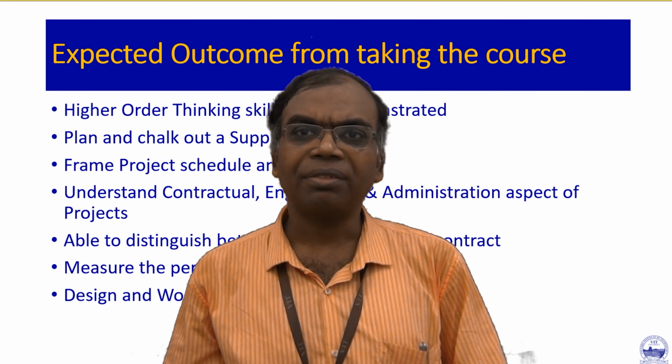Moving on, you will also see that you need to source objects at the right time. So you cannot source, for instance, tiles at the time when you're constructing your foundation. You need to source it in sync with the master schedule, and you cannot source tiles after the delivery date also. So there's a sweet point where you buy it at a time when the cost of the tile is very cheap, the cost of storing and stacking is not going to pinch your pocket, and you're also not going to have to protect it from damage and so on.